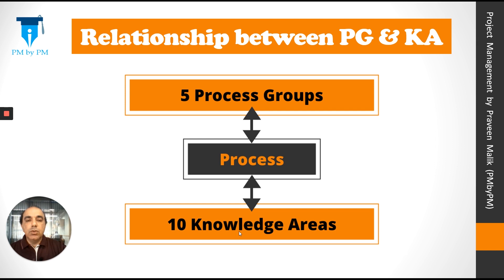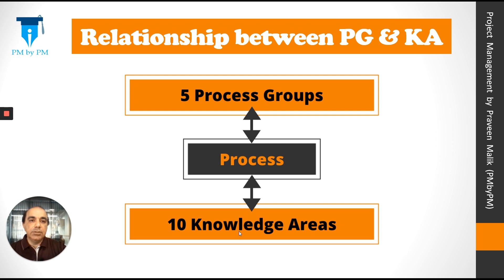Is there a relationship between a process group and a knowledge area? Yes there is. A process belongs to one process group and similarly a process belongs to one knowledge area. All 49 processes are divided into five process groups, and similarly all 49 processes are divided into 10 knowledge areas.